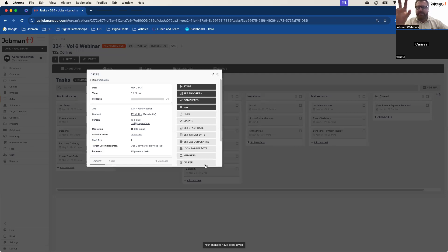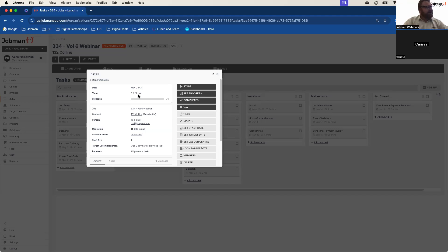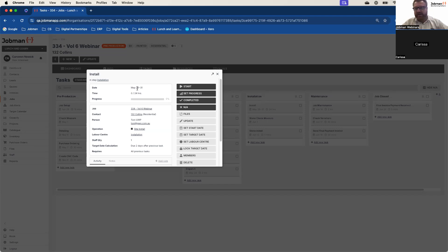Because this is going to take more than one day to complete, you can see automatically JobMan has gone: okay, to get this in by the 31st, I actually need to kick off on the 28th. And it's smarter than that — JobMan also takes stock of things like if you tell it we don't work on weekends or public holidays, it won't factor those days in. So if this happened to fall on a Monday, it would actually tell me I needed to start on the 26th — I need three days to complete the job but I lose two days from the weekend. So it's really clever.